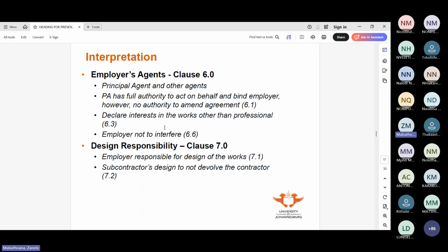When we say documents under this clause, we mean all the documents that I refer to in this agreement, so the current edition with all the amendments too. If the client makes any amendments to the contract, or anything that was submitted with the contractor's tender and accepted. Sometimes when contractors submit a tender, they submit it with qualifications, and it's up to the employer to accept the qualifications or reject them. So let's say it's accepted with the qualifications, then that part of the document will be those qualifications.